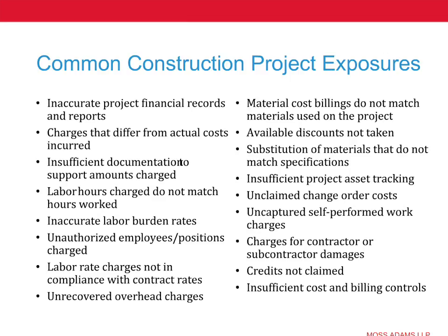And I think the key takeaway here is that for those that do it well, it's pretty regimented and pretty straightforward. Success with good project financial records and reports comes from having good information on what your various activities are on the project, basically your schedule of values, having your commitments measured continuously against your schedule of values amounts, and understanding where you stand at any given point in time against them, having consistent cost codes applied as you're recording your commitments and your actual costs.